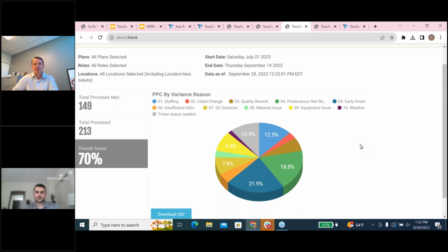Is there a missing conversation there? And maybe that trade's level of done isn't what they expected. And so this created that ability to have conversation around that, and we'd be reviewing that at our weekly work planning meetings. But in the event that it was a quick hitter, this also creates the opportunity to have that conversation right then.